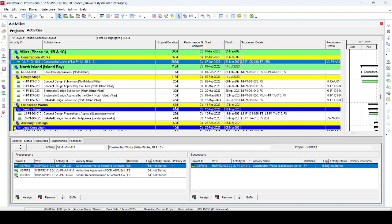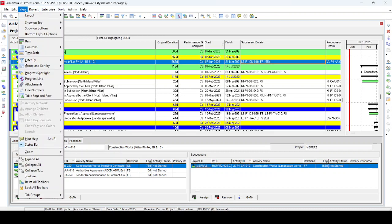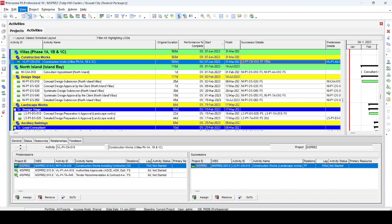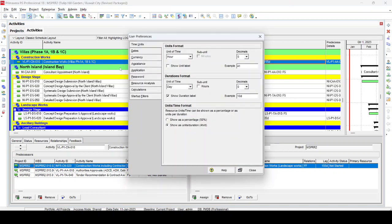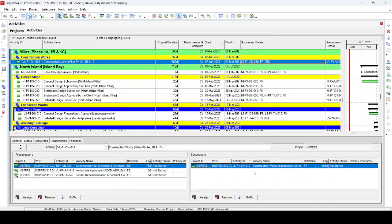That is why this method is not very accurate. When using it, it is better to tell your contractor or supplier not to use the letter 'd' — uppercase or lowercase — in their Activity IDs. If there is no 'd' in the Activity IDs, this method will work properly. Also, before using this filter you must go to Edit, User Preferences, Time Units, and ensure 'Show Duration Label as d' is checked, so lags will display with 'd'.